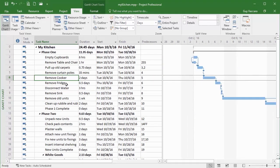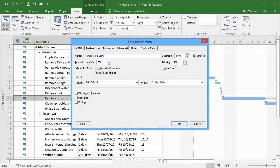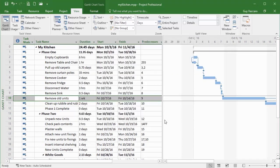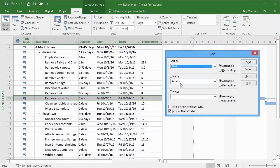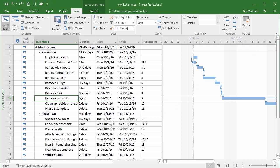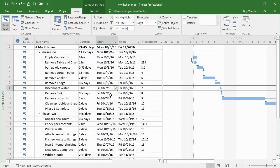There's no movement whatsoever, so let's take task 10 through to 7 — 'Remove Old Units' — change its priority and push that up to 700. Then go back into Sort, Sort By — it remembers what we put in before: start and priority — then Sort, and still nothing happens. The reason for that is that although we're sorting by what we think is the start date, behind each of these dates there is a time element as well. Although they appear to start at the same time, they don't — one starts on October 7th and lasts three hours, then half a day, then one week.